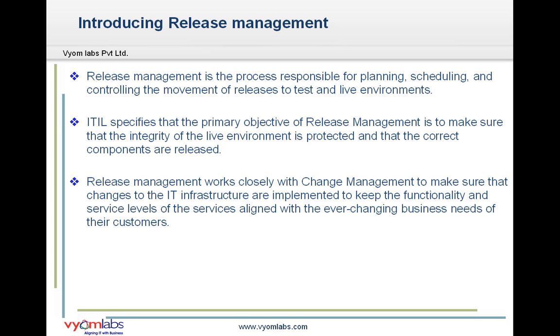And when we are talking about the release, we should know what types of releases there are in a release request process and when we will be using them. So, we could have full, delta, package and backlog release types in a release request. Talking about the first release type, that is full, we would use this release type when all the components of the release are built, tested and deployed together. So if we want to make sure that the release or version of an application plus the necessary CI components to run the application are all linked throughout the entire process.